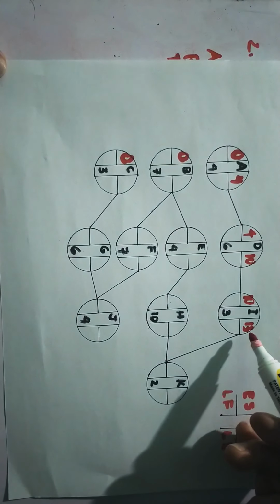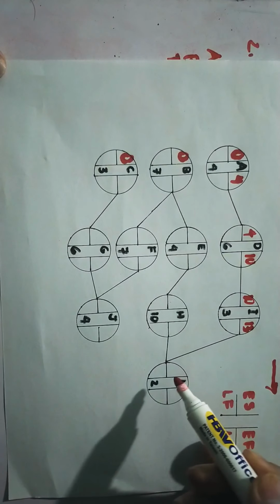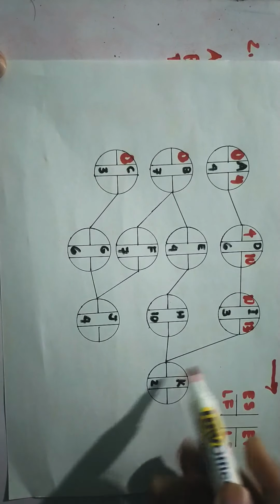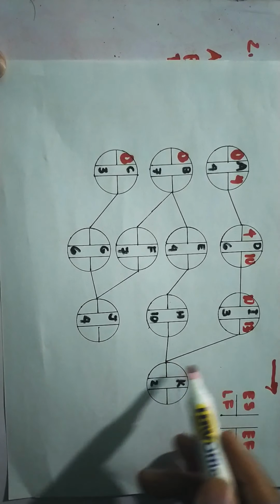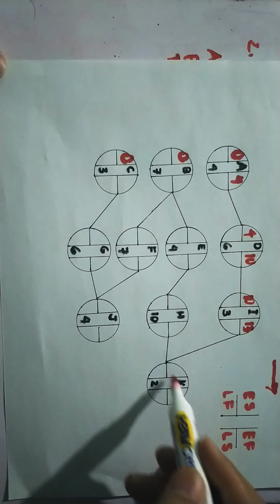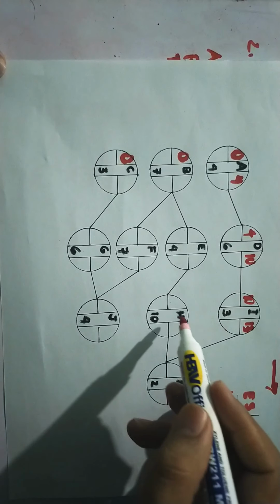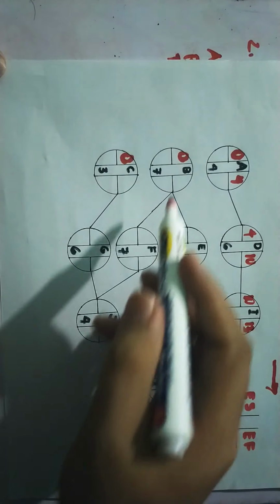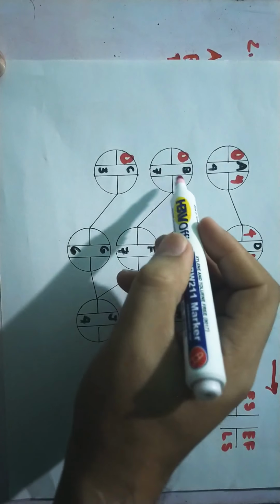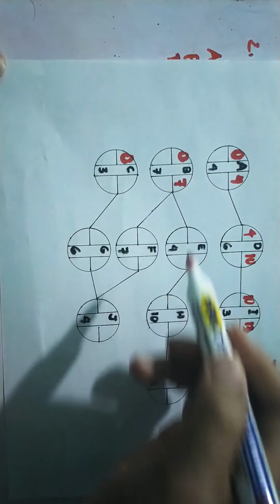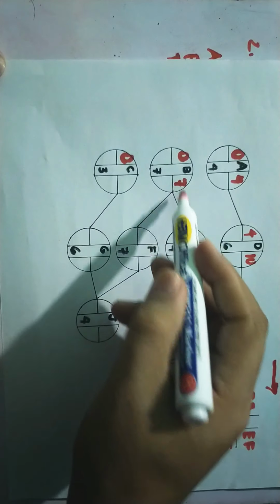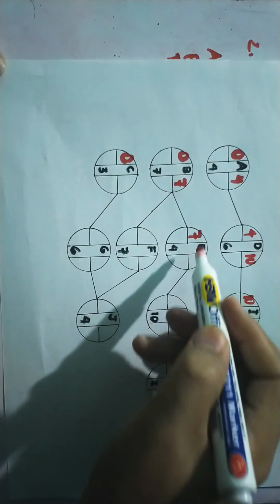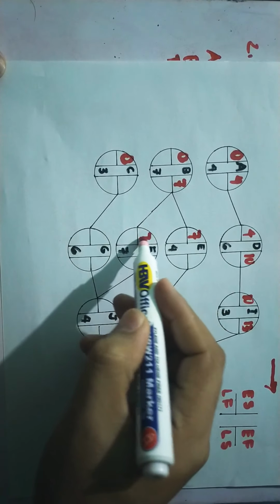Now we cannot copy immediately 13 to this portion, because there are two paths that come into this K. We have I and H, so we will just determine first what is the value for H. Okay, we go back to this one, 0 plus 7, that is equivalent to 7. And then we have here 7, copy 7, as well as this one, that is 7.